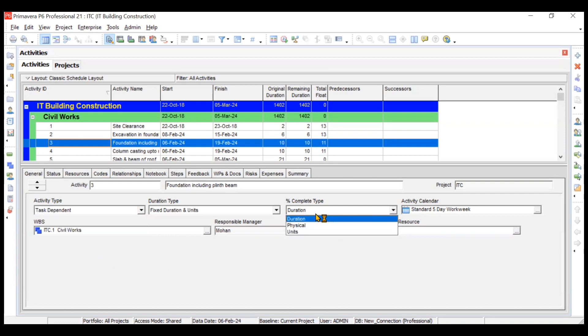Moving on to percentage completion type, there are three types: duration, physical, and units. Duration completion type means that if an activity takes 10 days, after the fifth day 50% of the activity should be completed — quantities are consumed uniformly based on duration, meaning 10% of the work must be done every day. You can see foundation here is taking 10 days as an example.